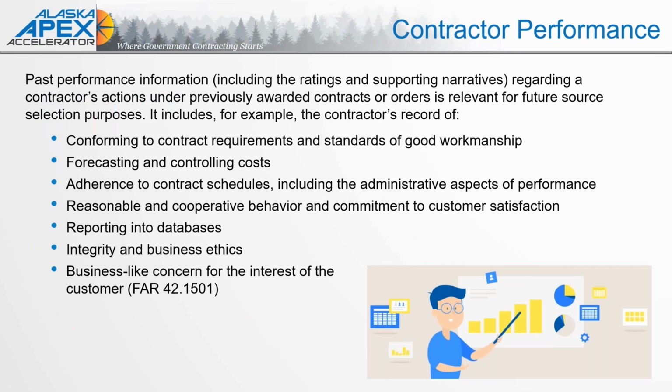Okay, contractor performance. From a contractor perspective, we've done the work, we've received our funds, and now we need that past performance data. Completing that past performance information should not be done only at the end of the contract, but also at the end of every option year. So if you do have multiple option years, you want to think about these little mini levels of contract closeout for that performance year, if not necessarily the entirety of the contract.